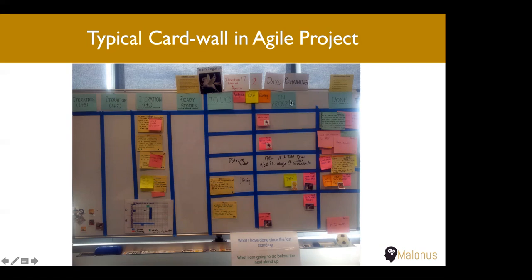So it is an important recommendation. As and when you are working in Scrum, try to make sure that you have one single in progress column instead of multiple columns, which may look nice on the board but create more problems than they solve. You may have the subtasks around each story, mentioned like in the stickies over here, and you can mention what work we are doing together, but there should be one column around it.